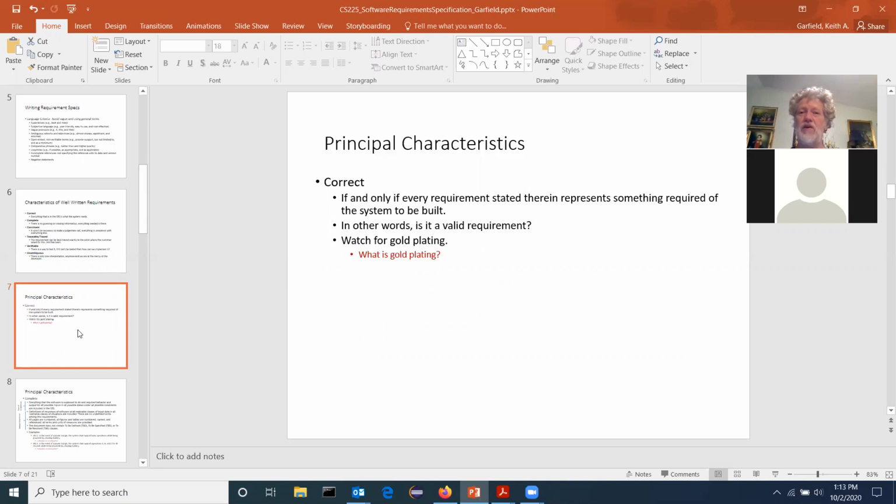But if you do, I wouldn't make it a requirement. What if you think, oh, we're going to add this extra thing and it won't take much time, let's make that a requirement. And then it turns out it's harder than you thought and you fail that requirement. Now you've failed a requirement that was never supposed to be there in the first place. So don't make it a requirement. Don't put yourself on the hook for things that are not asked for by the customer. Now, if you wanted to please your customer so they come back next year with another contract, that's a different situation. But you don't have to make it a requirement.